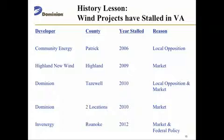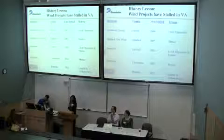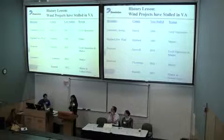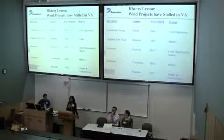We had the project in Tazewell in 2010 when we were before the Board of Supervisors, and they voted to put in a wind ordinance that made it impossible for us to build on that site until the wind ordinance is reversed. We have the other two localities in that same time frame, 2009, because of the gas prices. They became uneconomical. They do remain in development.